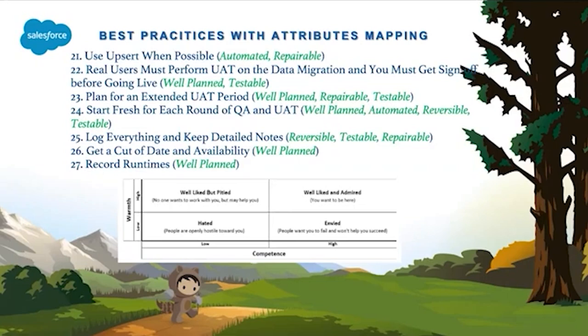Always have a plan B in place of a week or so buffer in addition to that UAT period when it comes to data migration, so that the users will get the confidence once they complete testing, saying this data migration production deployment is going to be effective. And also whoever is involved from the data migration experts, they will have enough space, enough time to